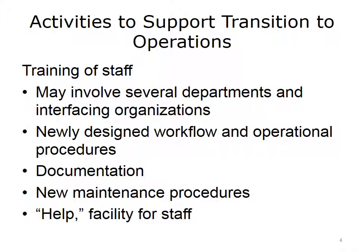There are several activities involved that will help you as you transition to operation. Make sure that training on the new health IT system, service, or process is done well, that there is sufficient and effective documentation, and there is effective specification of any new operational procedures that arise. It is also important to have an ongoing help facility, especially online, with easy access. The quality of these activities can go a long way in determining the overall success of your project. Even if the system itself is of high quality and has all the needed functionality, if staff are not well trained and don't have strong confidence in how to use it, it can be very detrimental to a smooth transition. We need effective documentation and help support — don't lose sight of these critical supporting activities.